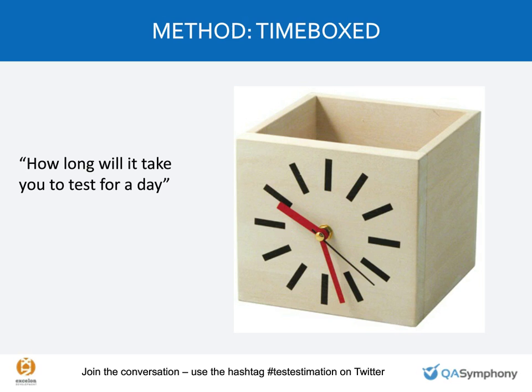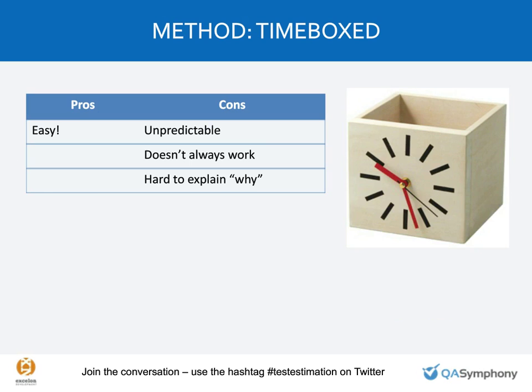What you're talking about, we're going to cover a little bit later, where we get a little more sophisticated. But if you just want me to test for a day, I could test for a day. Now, at the end of that day, I might say, these are the risks that are still uncovered. Can you test for a day? Sure. And at the end of that day, I might have 8 showstoppers. So saying we're going to test for a day doesn't guarantee that we're going to get done. You just get what you get.